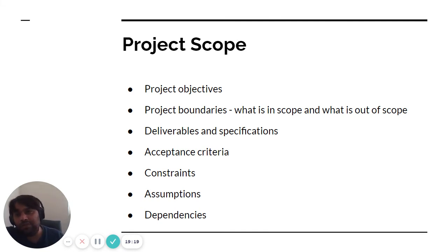So that is called the project scope, project objectives, whatever objectives are included in it. Project boundary: what is in scope, what is out of scope, right? So suppose you are going to build a Model 3. As a business analyst, you have to make sure that the 300-mile battery pack comes with 60 kilowatts of batteries. Some engineers suggest, I can fit in 80 or 90 kilowatts of battery, there is a space, but that is out of scope, right?